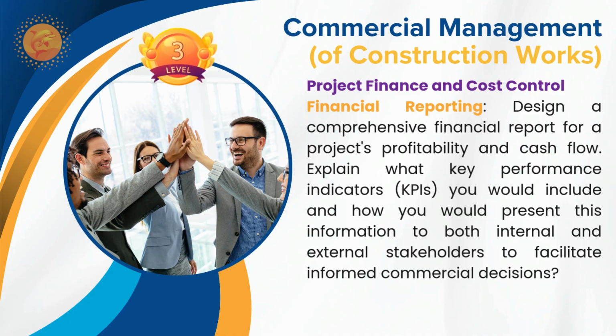Yes, of course. That is the way of doing earned value management. So in earned value, you have the value achieved and you compare it with your cost incurred, and you may address some things, like where you are actually losing or having variances in the value being certified to you. You need to identify these and make sure you address them in a timely manner in order to avoid any insolvency issues.